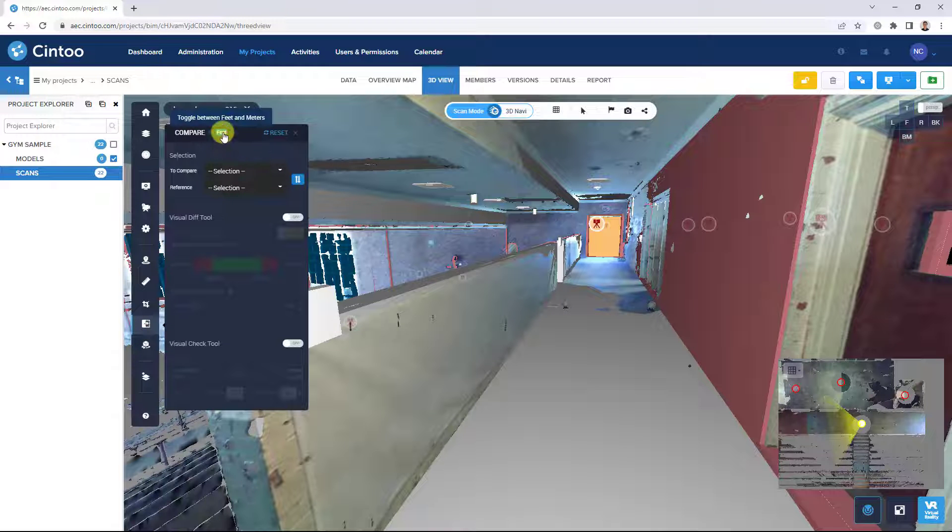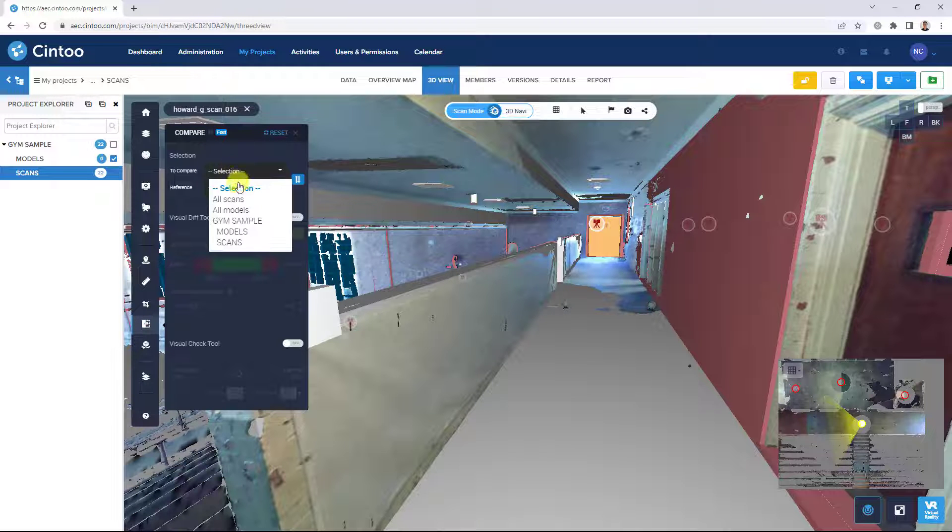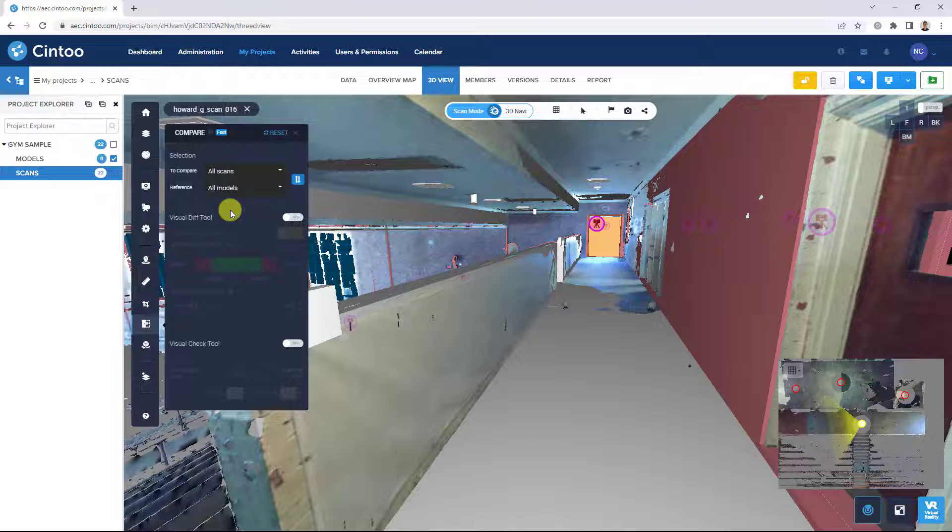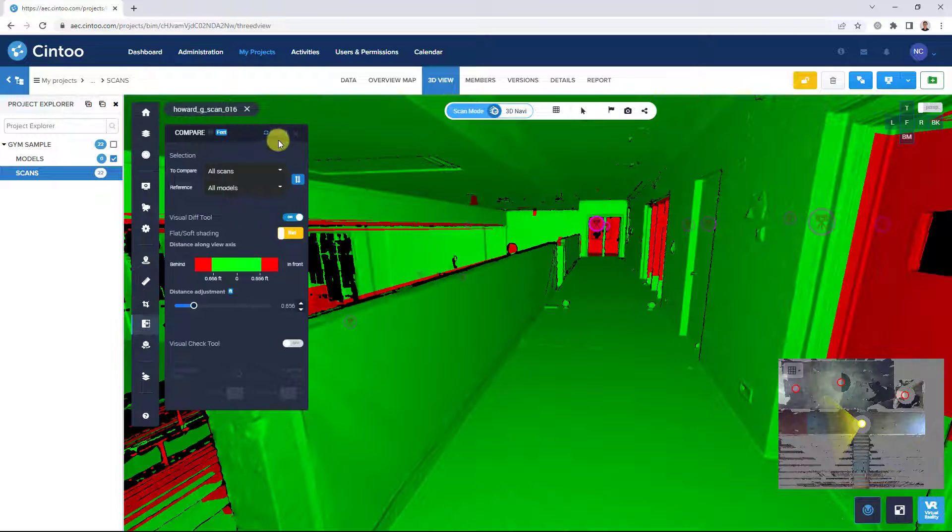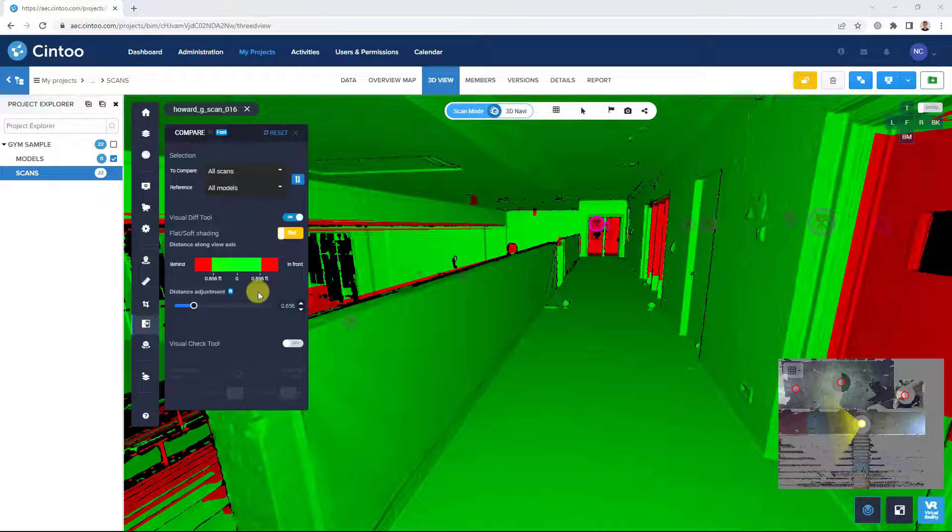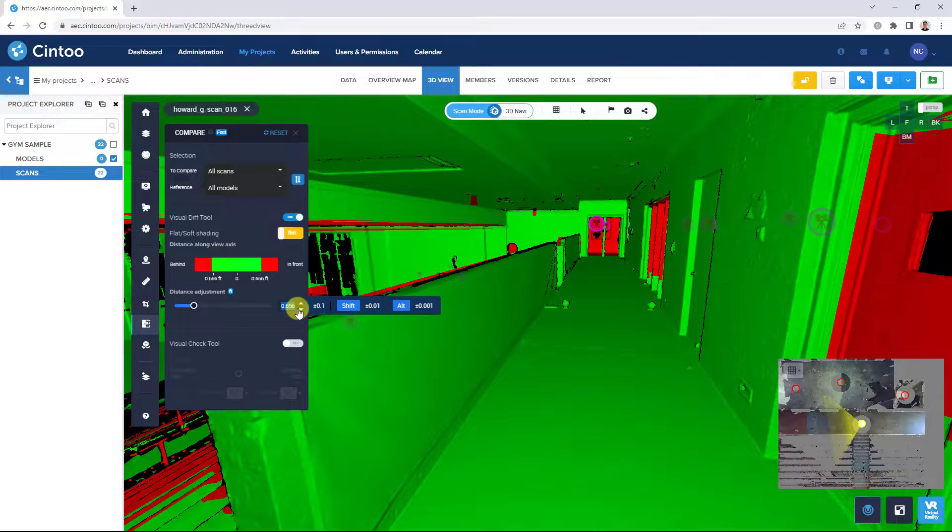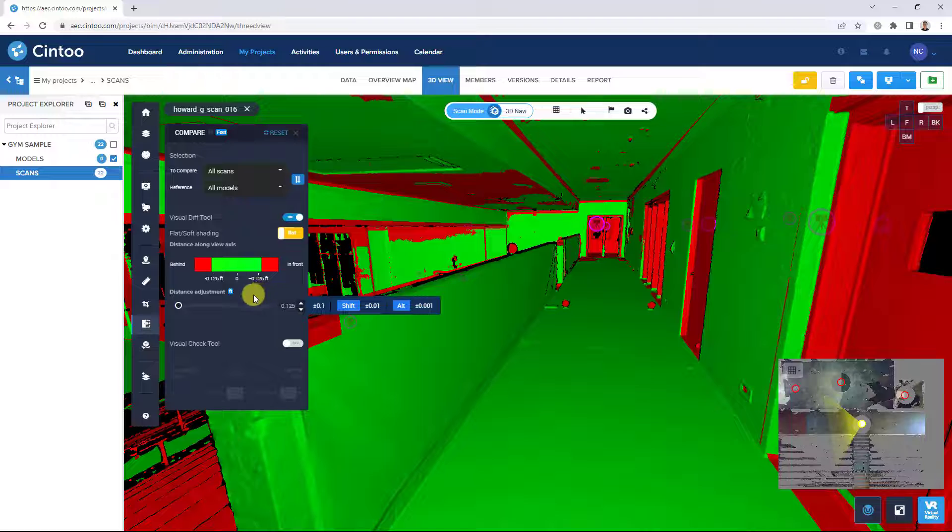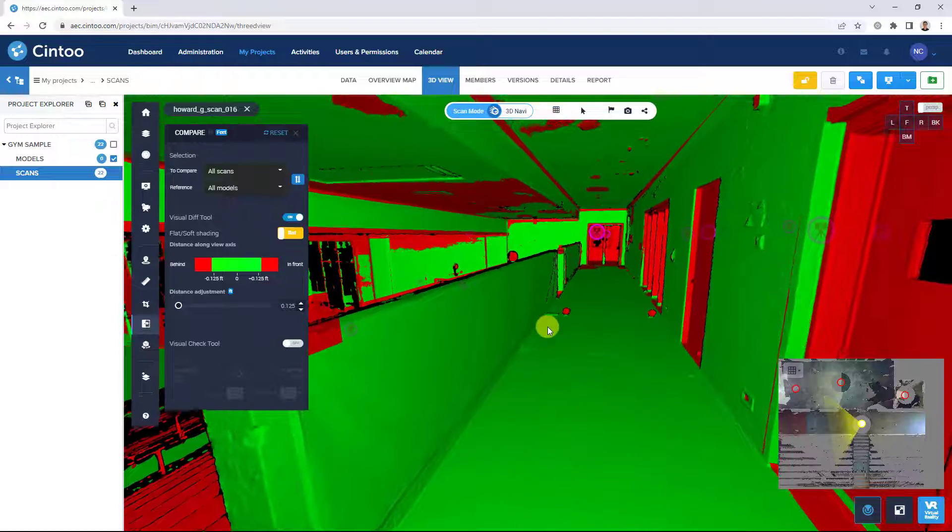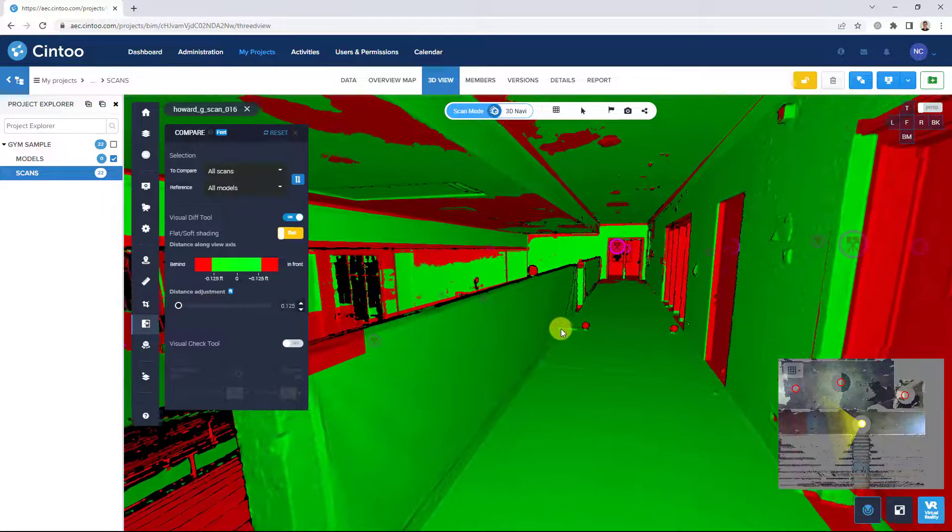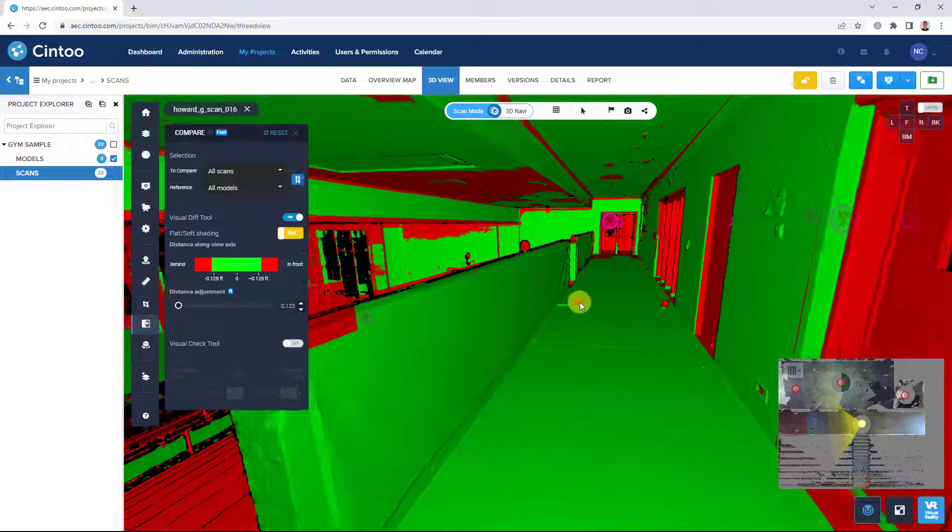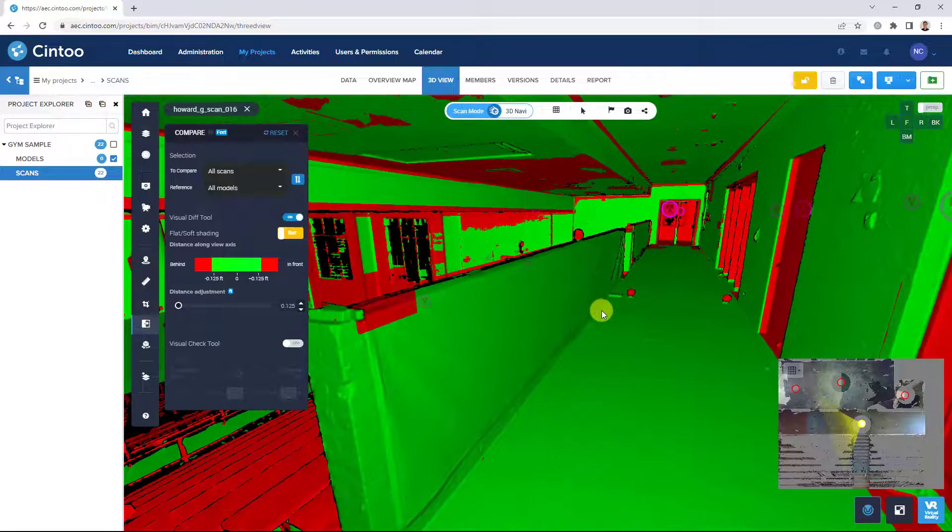We'll be doing this comparison in feet and we can compare our scans to our models and turn on the visual difference tool. We'll be using about a 1.5 inch tolerance for this comparison. And we can see items within tolerance highlighted in green and any items out of tolerance highlighted in red.